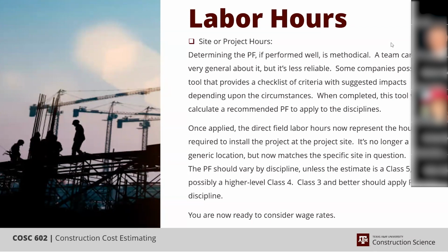The more vertical it is, the more productivity loss you have from people having to get up and down the stairs and ladders and working at height to get materials there. People get a little more nervous if it starts getting too high, and so forth. So I think you're applying this factor to the USGC, right? That is correct. Yes.